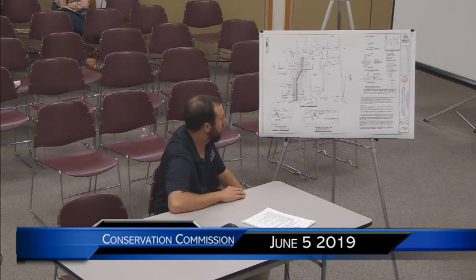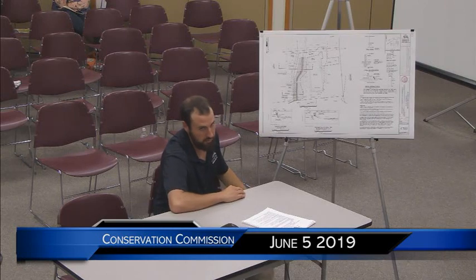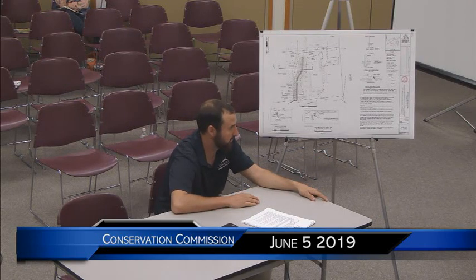I think part of how that is reconstructed after the construction is going to be up to the contractor's means and methods that we can discuss at the pre-construction meeting. But we may need to see it as an official change in plan, how it's going to be reconstructed. Right now, we're proposing to reconstruct it in kind, exactly as it is. Exactly. So if that changes, then they'd have to come right back here before they can put it back together. If they change it in any way.